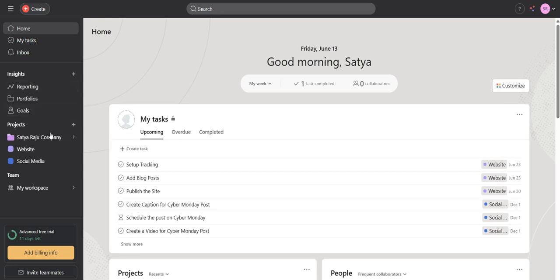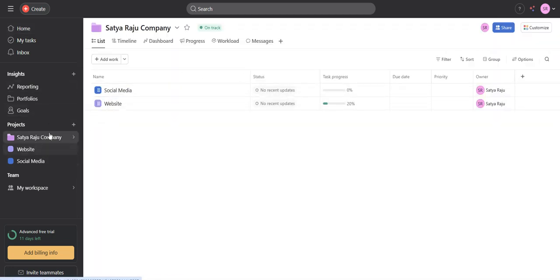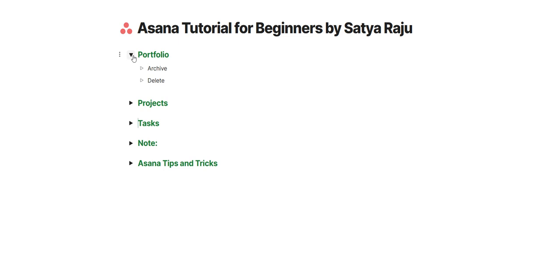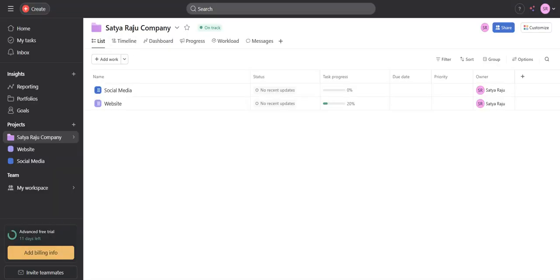For the purpose of this video, I have just created a test portfolio named Satyaraju company. You might be working with another company, providing services, or you might have a vendor or something like that. Then always create a portfolio at the level of the company, so that you can group all the projects for a particular company together inside that portfolio.